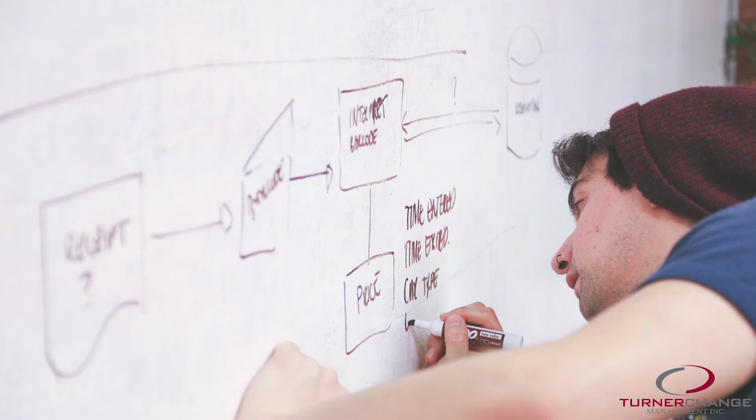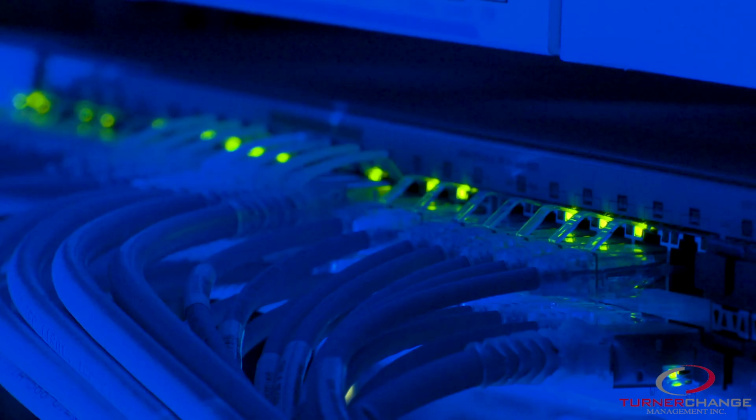So a project plan for the implementation of new technology will outline the specific tasks, deliverables, and milestones to get that new technology implemented. Some of the typical tasks that you might see in a project plan for new technology might start with defining the requirements for that technology, the purchasing and selection of new hardware and software, the configuration of the software and the implementation or building of the hardware.